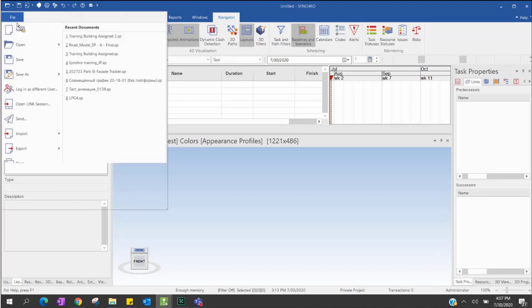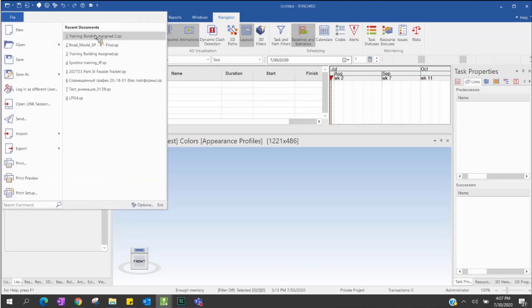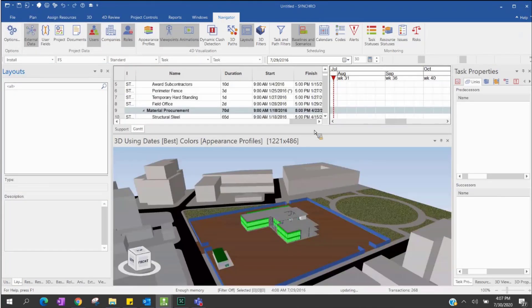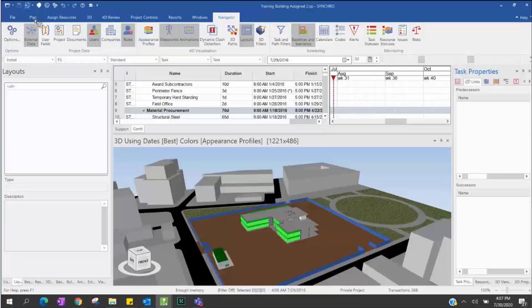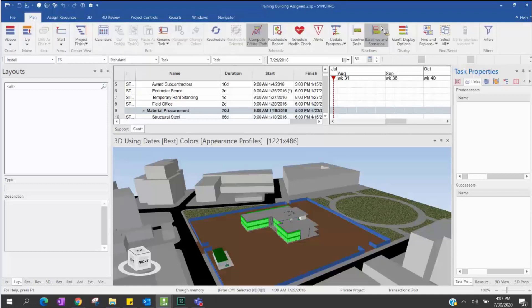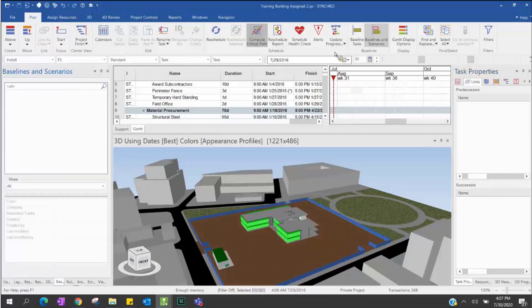I will open one project. In Synchro, if you want to see the baseline, you can go to the Plan menu. On the Plan menu, we can see there is a baseline in Synchro. When you click this, we can see the baseline window appear.